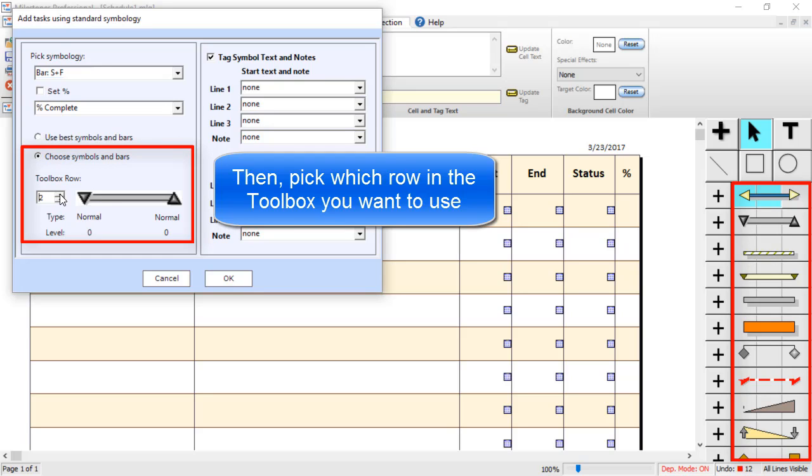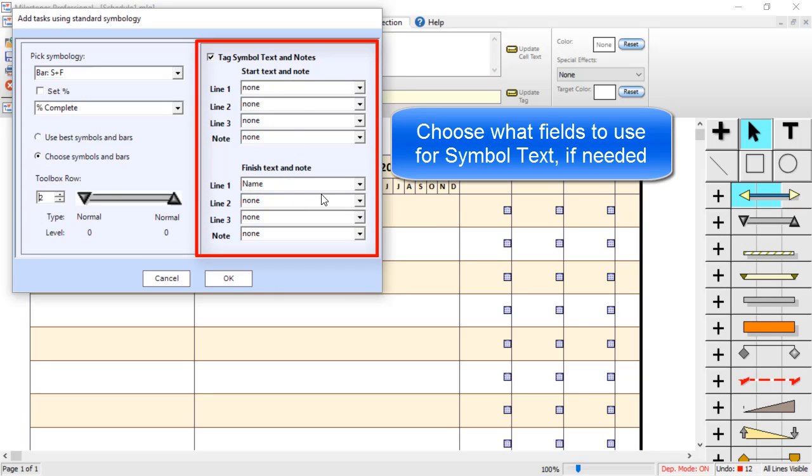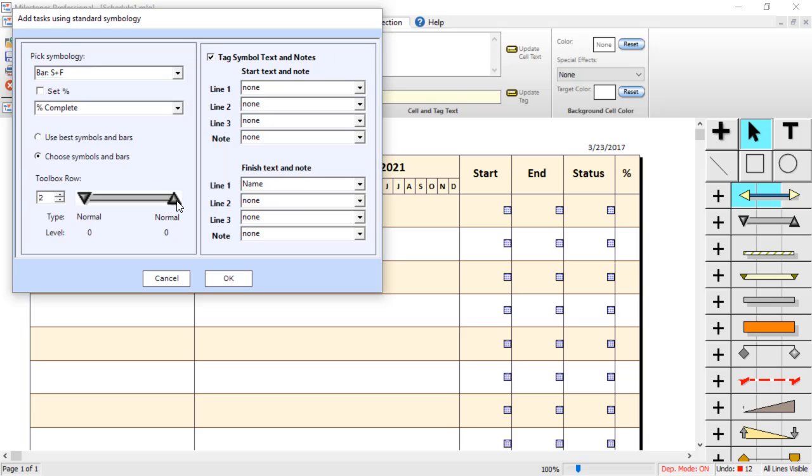So I can set that to Toolbox Row 2. I will just use this gray bar and these black triangles. Looks good. And then you can choose what Symbol Text you want to bring in. So for this case, it looks like I am going to bring in the Name field onto the Finish Symbol. That sounds good to me.